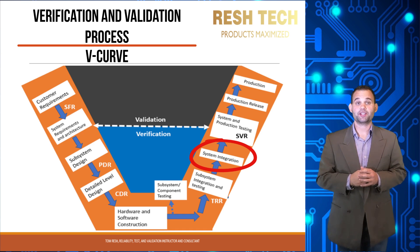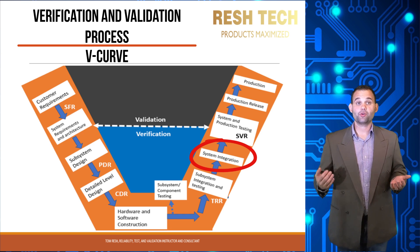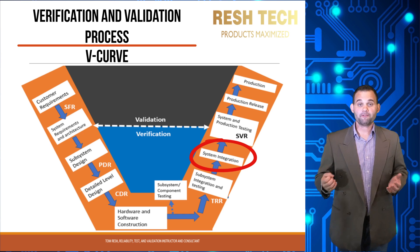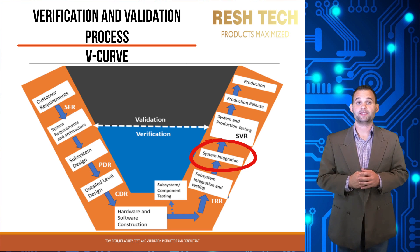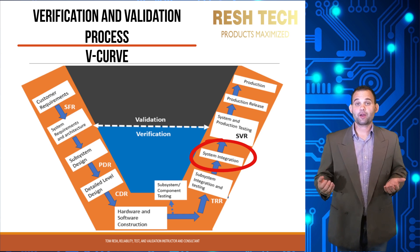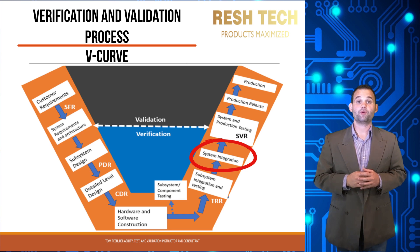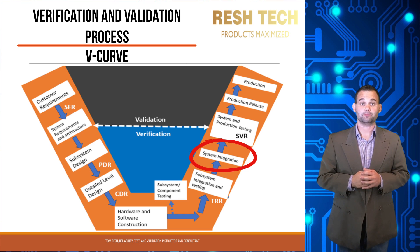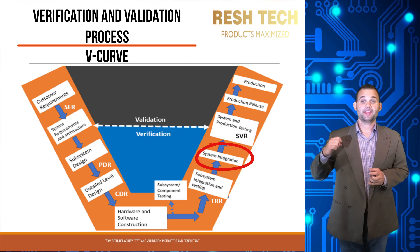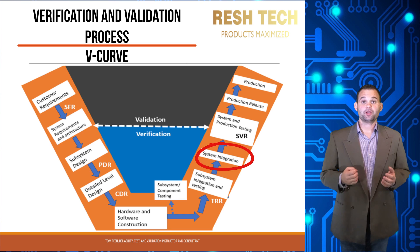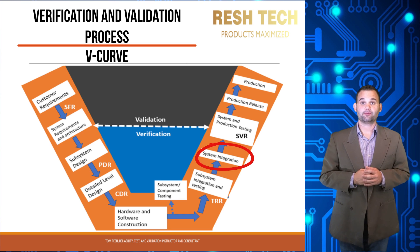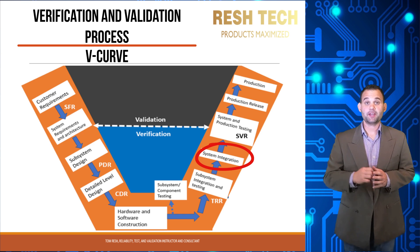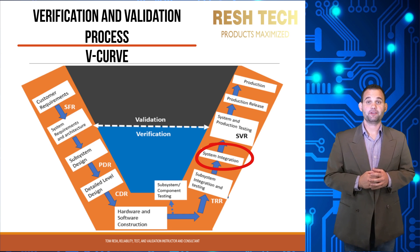Next is system integration and testing, where all subassemblies are brought together as a unified system. This verification step ensures that subassemblies operate together meeting the requirements and features defined in the system requirements and architecture. On the software side, all software modules are integrated and tested against software and system requirements using predetermined system-level test cases. However, completing this step does not mean you are done — functionality and feature verification under optimal conditions is only part of the design equation.